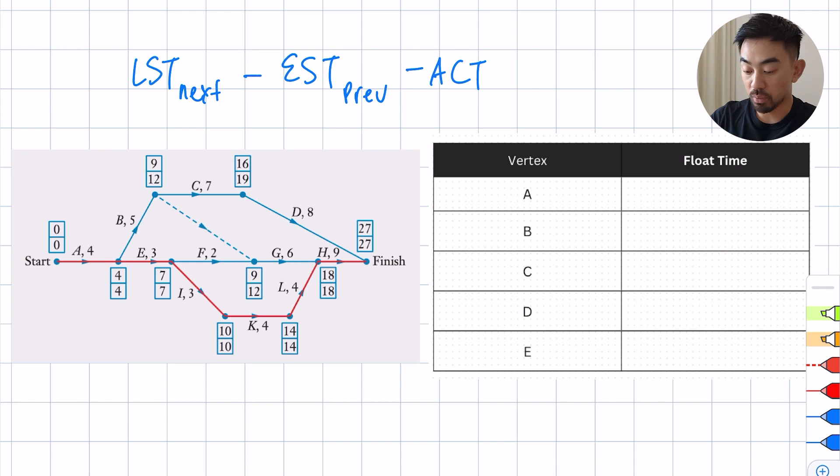For example, if I want to find the float time of A, I look at the next late start time which is 4, and I look at the previous start time of the early which is 0, and I minus the activity. So for A you're going to have 4 minus 0, the top box, minus 4. What's 4 minus 0 minus 4? Well that's 0. So the float time of A is 0, which makes sense because it's on the critical path.